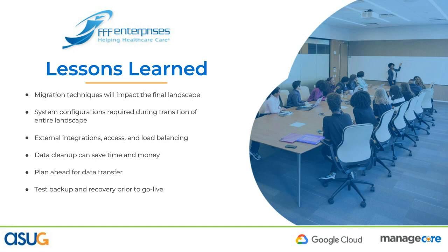You just want to plan ahead for that, because if you need more bandwidth, that does take time as well to ask your carrier. And you always want to make sure you test your backup and recovery prior to go live.